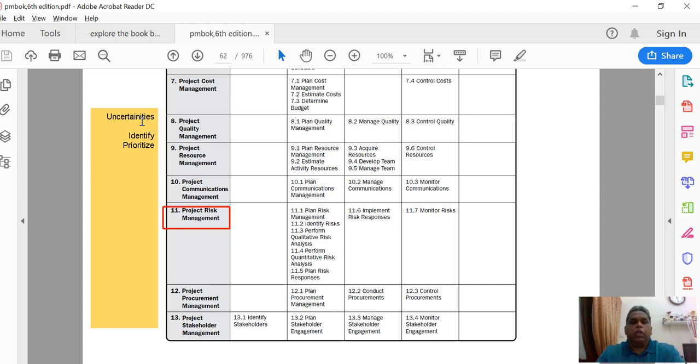In other words, we would need to kind of have a mechanism whereby we say, well, these are the red risks on the projects, these are the amber risks, or these are the green risks, or these are the high, medium, or low risks on the projects. Again, you might not have the resources, or you might not intend to deal with all the risks on the project. There has to be a way of analyzing and prioritizing your risks on the projects.